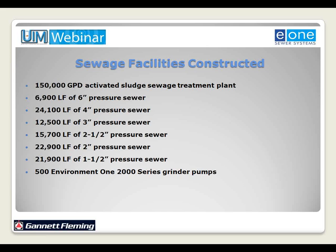And then also we purchased 500 Environment One 2000 series grinder pumps. That's the series or model of grinder pump prior to the current Extreme grinder pump. And the sewer line was all installed with open cut installation methods using SDR21 PVC pipe. Now, since the completion of this particular sewage facilities project and the development of directional drilling within Western Pennsylvania, HDPE pipe is used much more commonly. In fact, Gannett Fleming, that's what they require on their projects, directional drilling using the HDPE pipe.